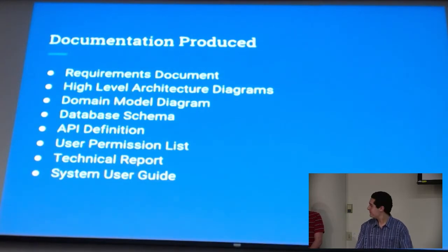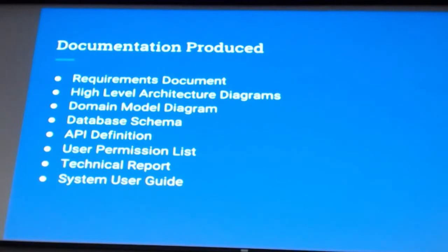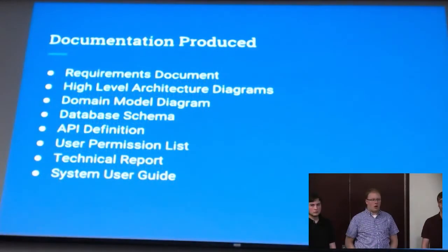So at the start of the fall semester, our team and the sponsor agreed that we wanted to stop development in mid-April and cut our first official release. We decided to do this for two reasons. Number one, so that the sponsor could use the system in his studio while the five of us are still in school. And for a second reason, so we could focus on documentation.